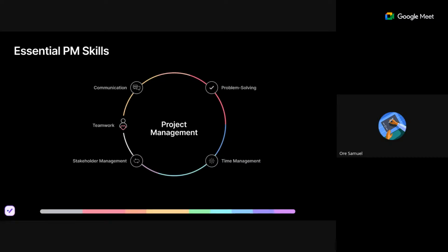Okay, here is where we are in the project, right? So even as a project manager, there's something called status updates, right? Always have milestones. Maybe every 3 months I'm going to give you an update on where we are in building your house currently. So for the first 3 months, you go to him and say, okay, we've done this so far. This is what we're yet to do. This is where we currently are. These are some issues we're facing, but we are on it already.